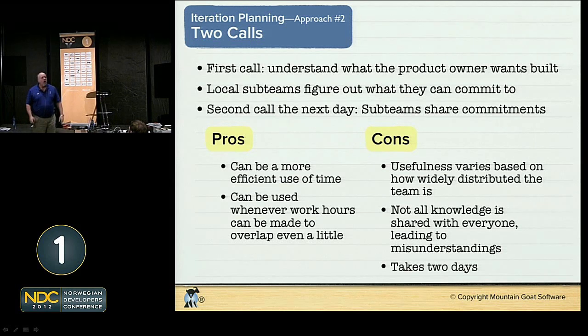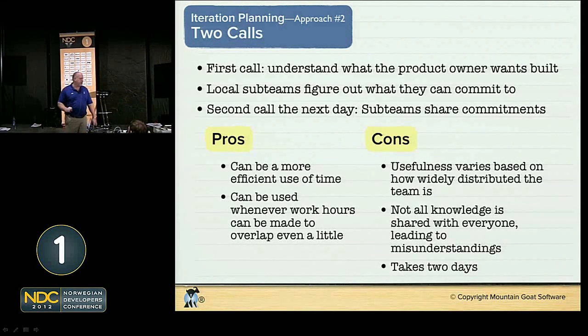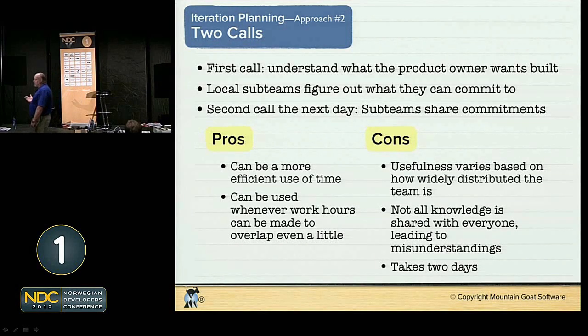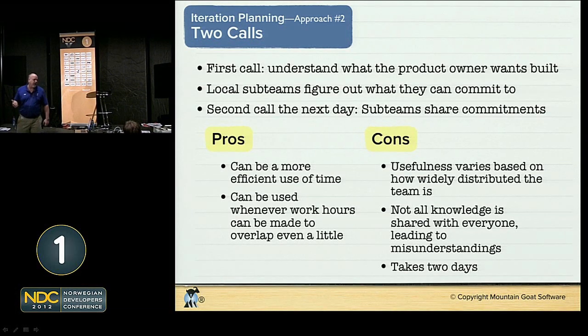We're done. On the clock, this probably took 26, 27 hours. But for any one team, it only took 2.5, maybe 3 hours. So it didn't take any longer than an in-person meeting would take. But the meeting's done in 2 parts in 2 cities. Right? It takes a little bit longer than 24 hours, but it's done very effectively. This is a normal way for doing this when we have a highly distributed team planning a sprint. Okay.